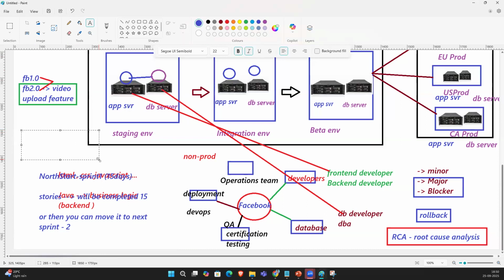What is SLA? Service level agreement. You understand service level agreement. So for an epic or story, the task will be completed within 15 days. The SLA is the service level agreement for this ticket, 15 days. If you are not complete within the 15 days, it will breach the SLA. SLA breaching means you are not performing well. Sometimes it is okay, but most of the times you need to complete it within the 15 days only.